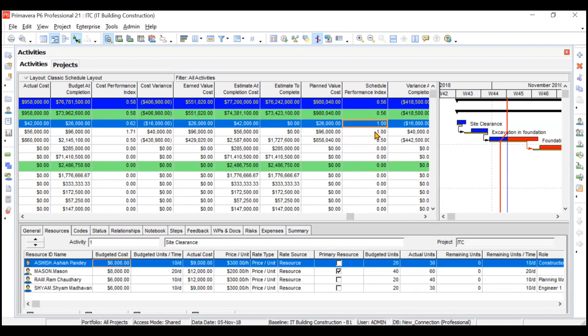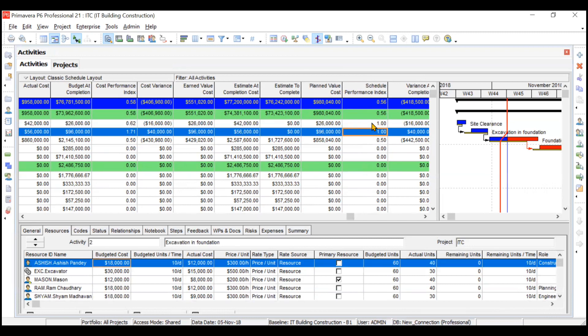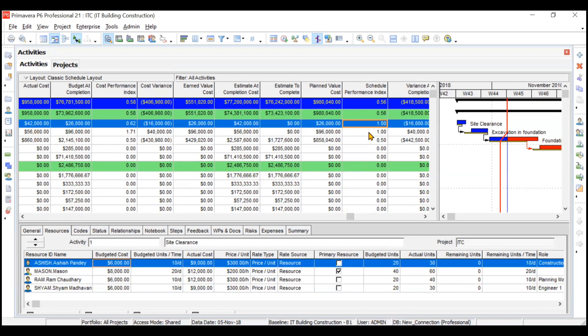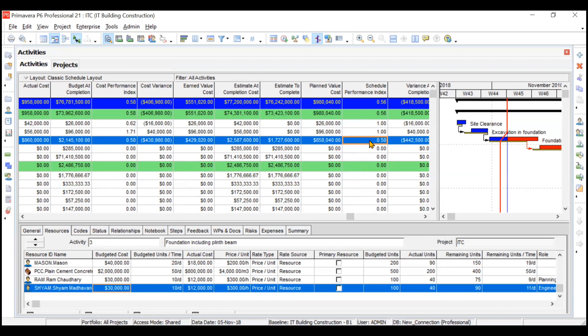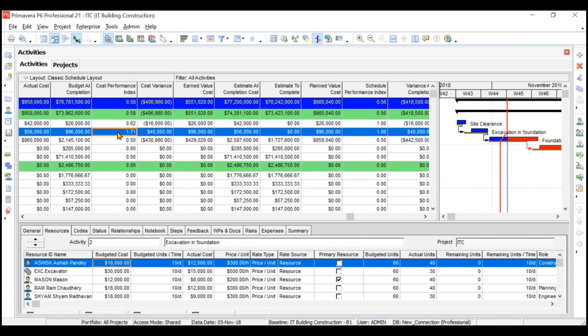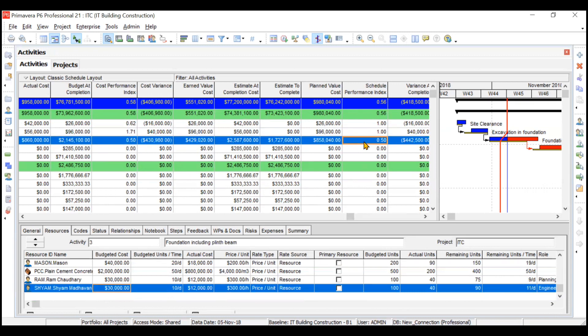Schedule Performance Index (SPI) is calculated as EV divided by Planned Value. For the first two activities it is approximately 1.0, while for the third activity SPI is 0.50, meaning it is running behind schedule. CPI tells you how much worth of work you get for every one dollar spent — for activity two, spending one dollar yields 1.71 worth of work. A CPI greater than 1 is expected, which occurs when actual cost is minimized.